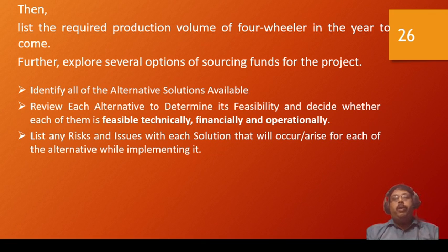It is also very important to decide whether each of them is feasible technically, financially or operationally. This is one of the very important things. Whatever we review should be checked for whether it is technically possible, financially achievable or operationally achievable. And also it is very important to list any risks in the suggested alternatives or already existing proposals. So that is one of the very important factors, listing the risk factors. So these are some of the factors which have to be considered when it comes to the feasibility study.